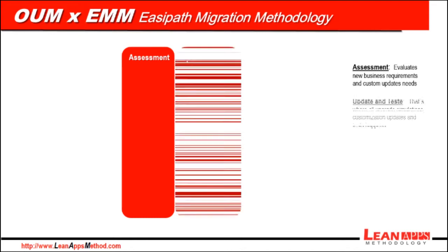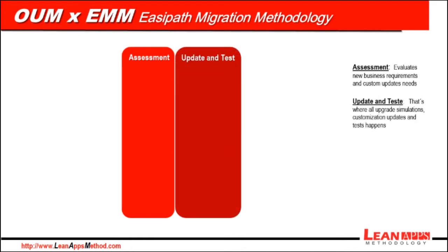Second is the update and test phase, and the goal of such phase is to update all components of the system and thoroughly test the migrated business solution. That's where all upgrade simulations, customization updates, and tests happen.